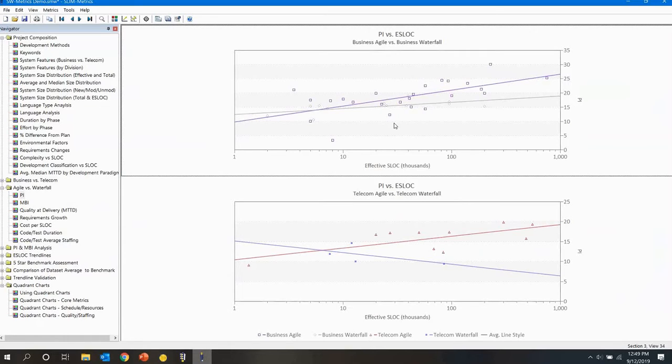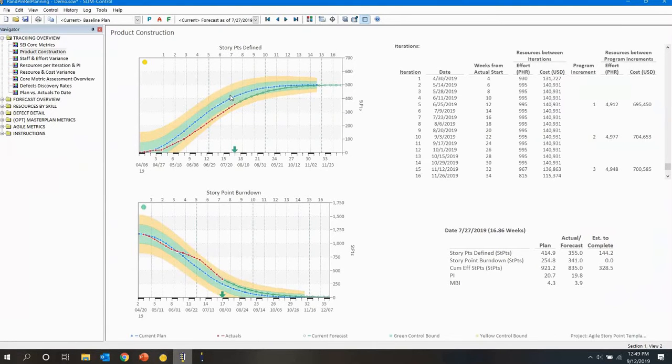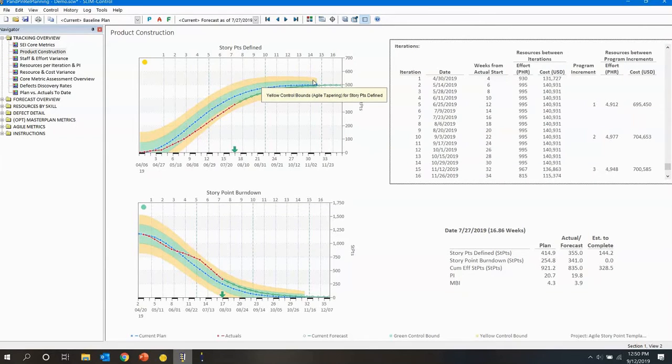Okay. Can you compare the original number of increments to the forecast? So that would be in Slim Control. You could do it visually by showing the increment lines originally for your plan, and then you may want to have another chart where you can show actuals plus forecast, and do like I've done here and toggle a chart to report, and then you can export these to Excel. So you could either do it visually, or like here you can see easily the difference is a little over 14 plus, well over 16, or you could do it in a spreadsheet with the different reports.